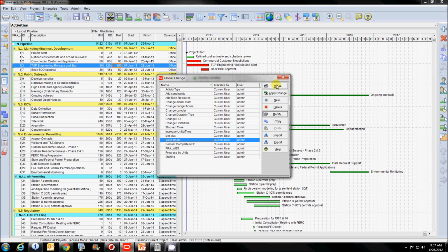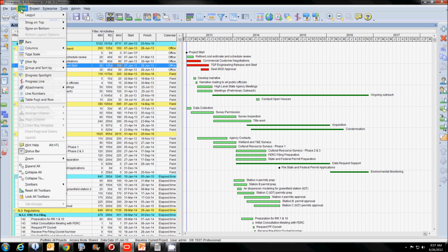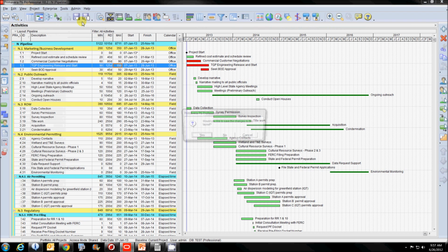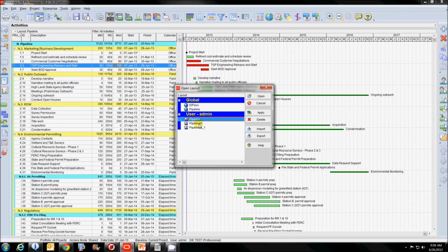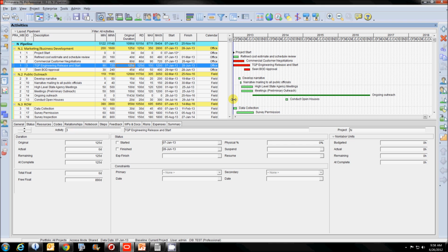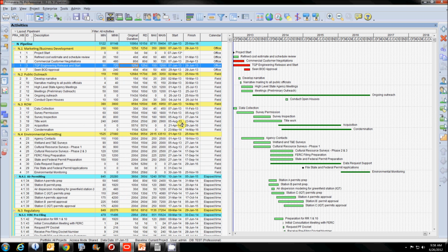So I'm taking basically a day and turning it into the number of hours. And you do that for all of the different calendars, so that eventually you end up with where we have our min H, which is now some multiple of the minimum and the maximum.